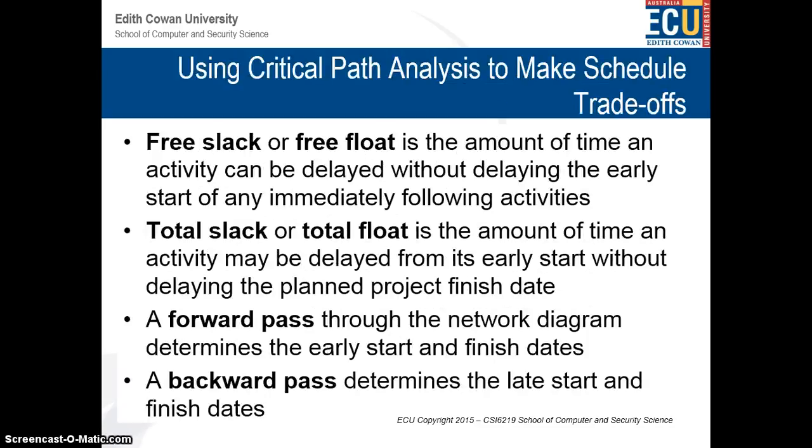Using critical path analysis makes schedule trade-offs. Free slack or free float is about the time an activity can be delayed without delaying the early start of any immediately following activity. Total slack or total float is the amount of time an activity may be delayed from its early start without delaying the planned project finish date.